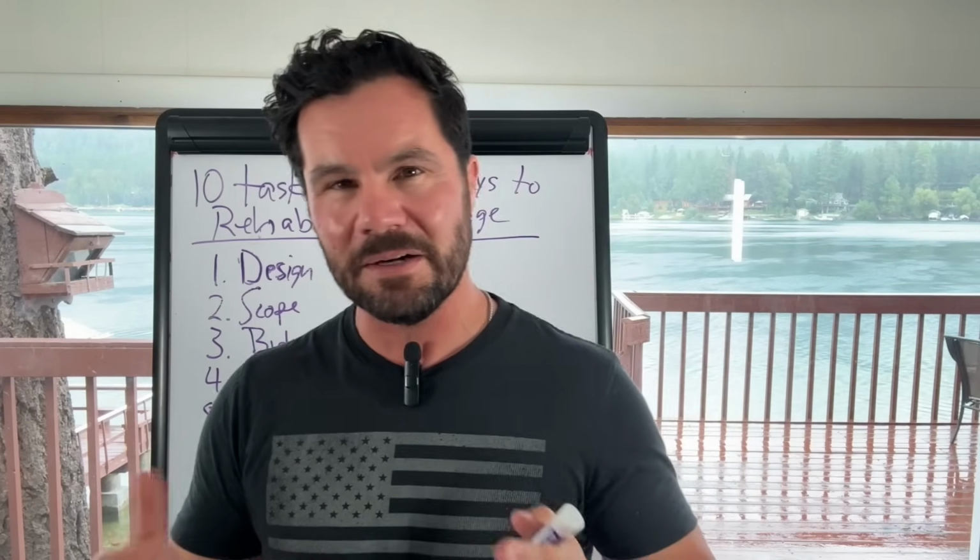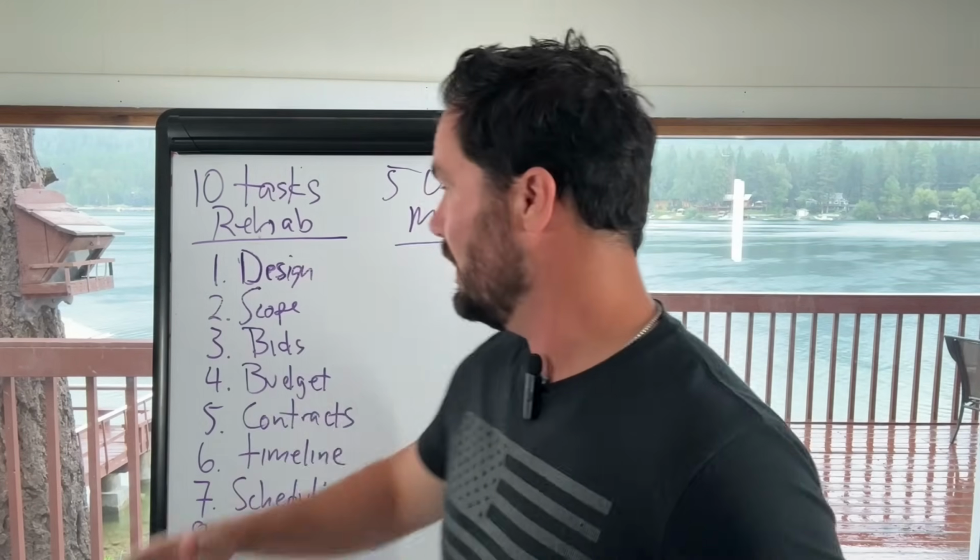Once you've got a very detailed scope of work, then it's time to get bids. And bids just means you're going to take that scope of work and you're going to have contractors bid on that work. Now, one quick tip here is I like to hire specialty contractors. I try to stay away from a jack of all trades, a handyman, if you will, because they're going to be okay at a lot of things, but not really good at one thing. And they're going to slow down your timeline because they can only do one thing at a time.